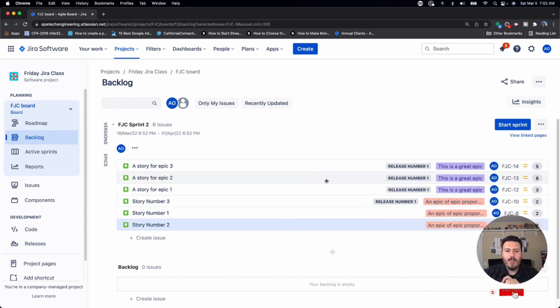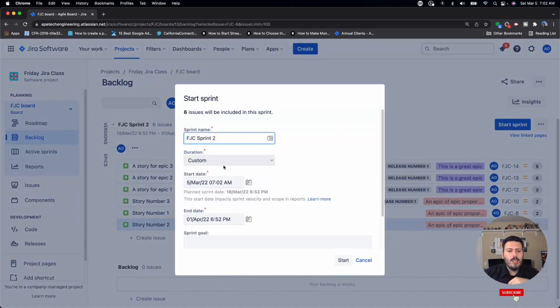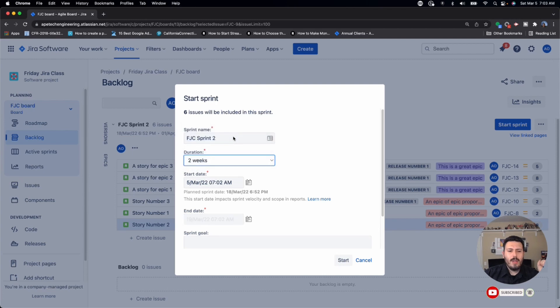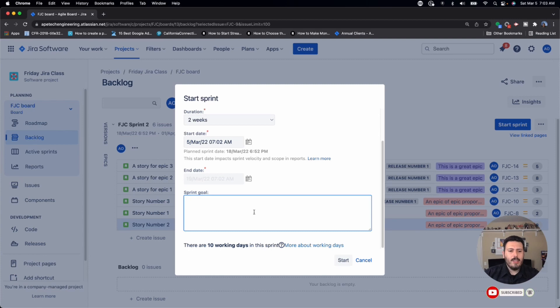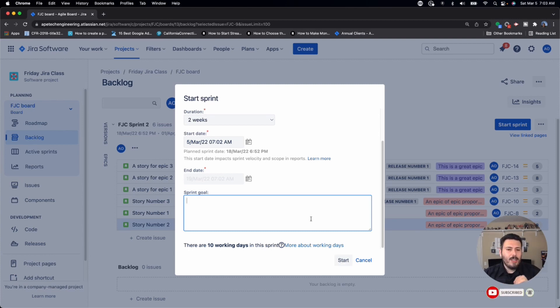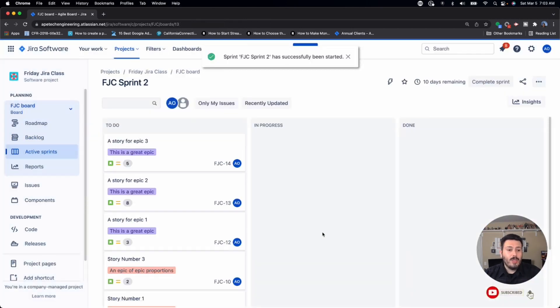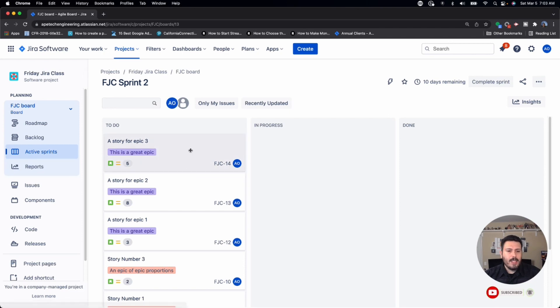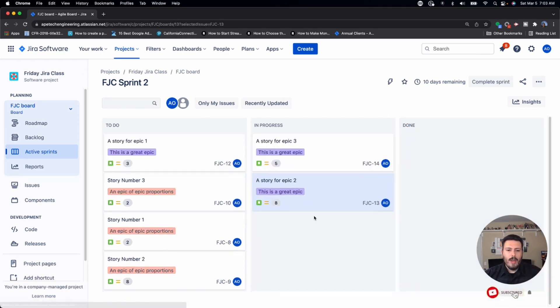And this is pretty much it. Once you've done this, the last thing you're going to want to do is click the start sprint button. You're going to give it a different name if you want to. I'm just going to drop it to two weeks as a default. It'll go from today to March 19th. Now, if you do practice a sprint goal, go ahead and put your sprint goal here. If your team uses the sprint goal, put it here. If not, that's cool too. It's not a required field. And that's it. You are now in the active sprint and your team is now free to basically update their stories.